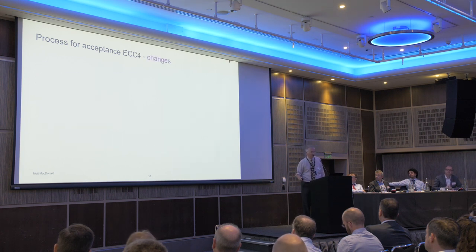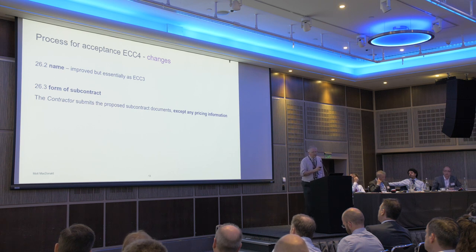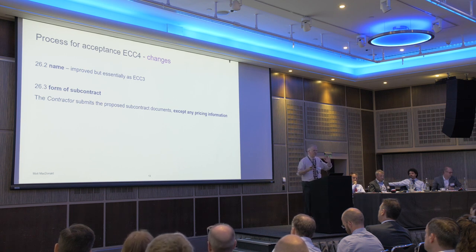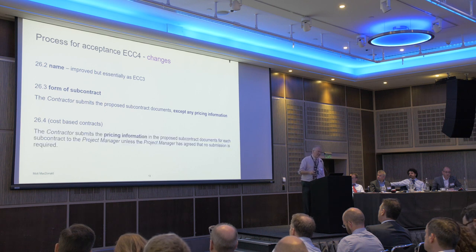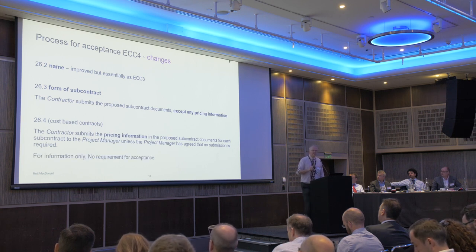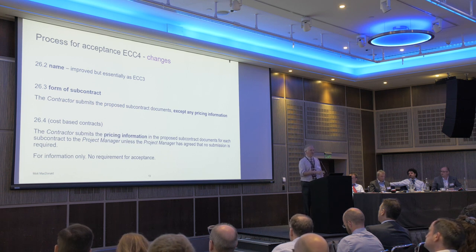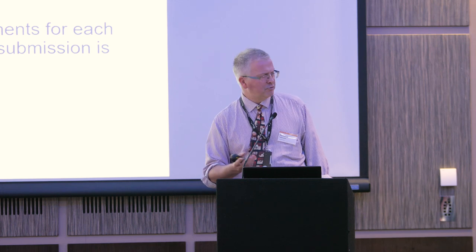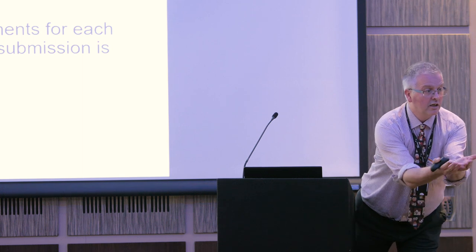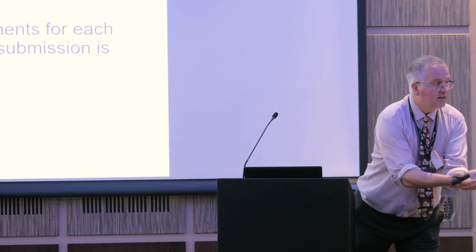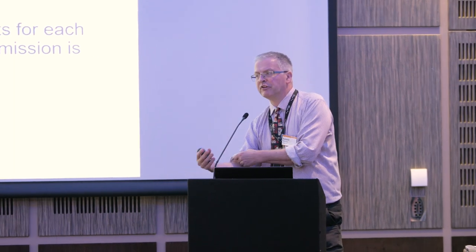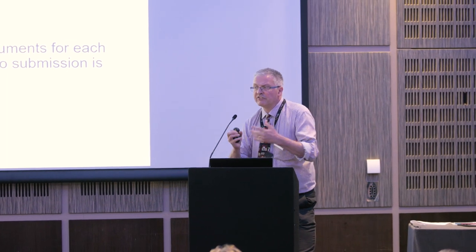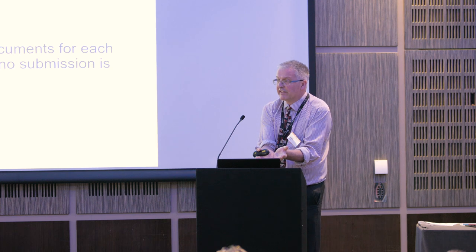It's better in NEC4. You've got to submit the form of subcontract, accept any pricing information — the law will define what pricing information is, but it's pretty obvious. And if you have a cost-based contract, NEC4 now says it would like to see the pricing information too. But that pricing information is for information only — there's no reason for the PM to accept or not accept it. Who's spending the money? Option C. If the contractor proposes a subcontract with ridiculously high pricing information, you can't directly reject it; you'd have to argue it's not defined cost — not competitively tendered or market rates.